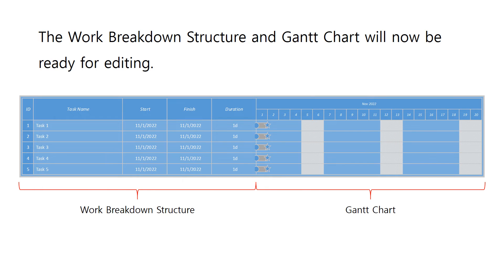Now the work breakdown structure and Gantt chart will be ready for further editing. The work breakdown structure is shown on the left, and on the right side you can see the Gantt chart visualized by horizontal bars. The WBS is comprised of five columns: the task number, task name, start date, finish date, and the duration. Notice the start and end shapes for the horizontal bars indicating the start and finish of every task. Also notice the white columns on the Gantt chart section — they indicate Saturdays and Sundays, highlighted since by default Microsoft Visio assumes there is no work during these days.